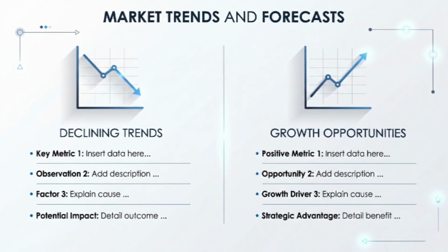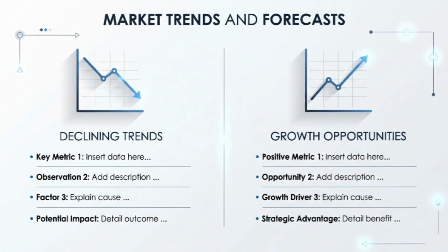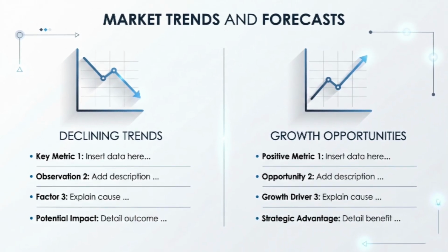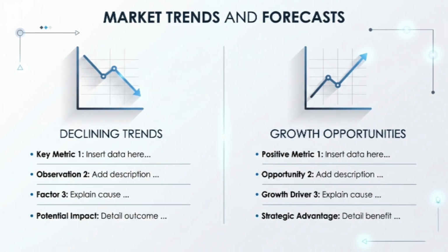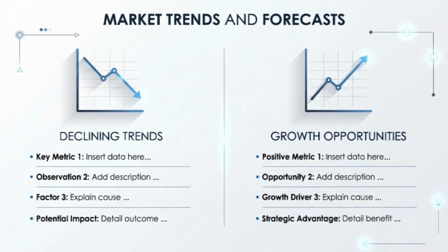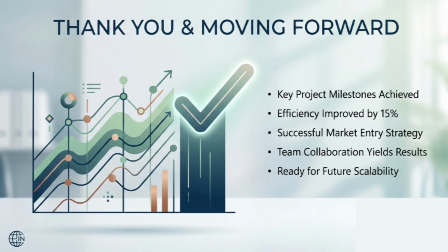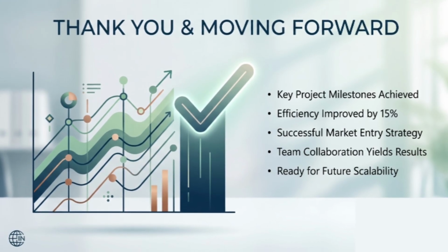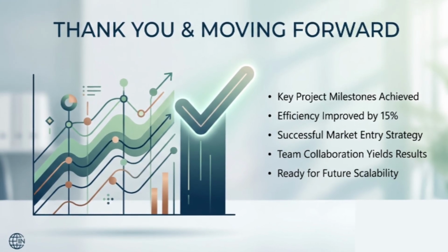It paints the full picture. It clearly communicates scope creep, protects the team from looking unproductive when requirements change, and shows a running total of the value delivered so far. To summarize, burndown is for simplicity and sprint focus, whereas burnup is for transparency and scope management.